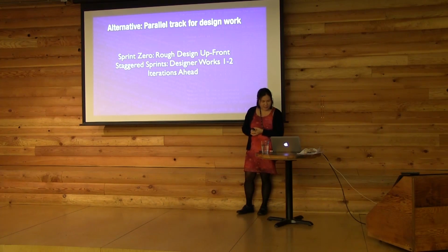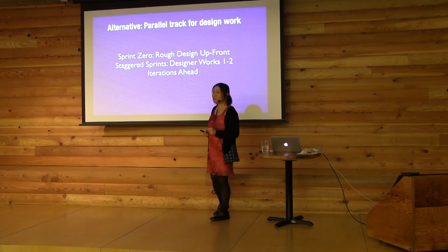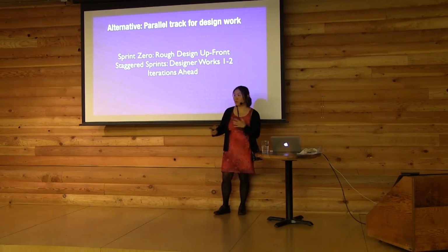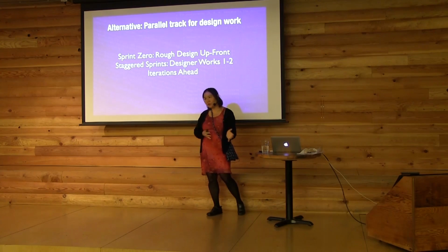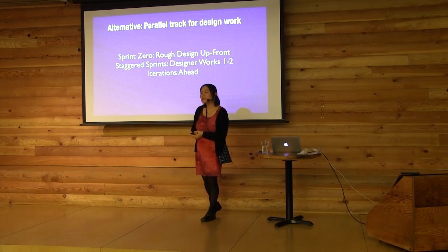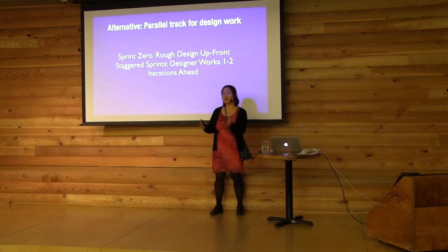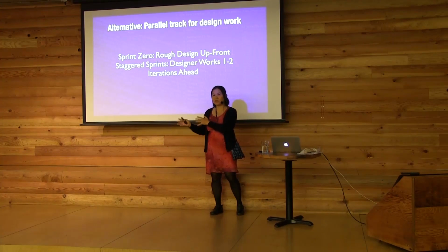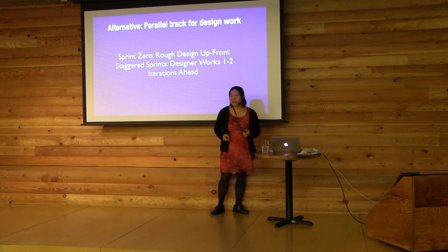There's a risk to this as well, which is that you can end up having a mini waterfall, designer-working-in-isolation process, and that tends to happen more when the designers work on a different set of stories than the developers. So you have to be disciplined, not just in the designer support, but also the developers have to take time off their implementation work to work with the designer. You need to make sure that communication is happening.